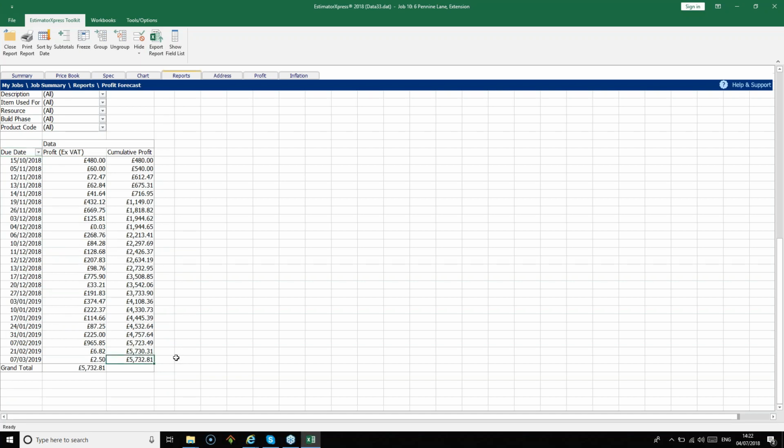If you have set the job up with all the profit markups set at 30%, then our general assumption is that half of that, the first 15%, will disappear in company overheads, thus leaving the remaining 15% as your actual net profit. So looking at the figure on screen, you'd want to halve it to get your actual projected net profit. So here's a quick example regarding profit. Imagine the total profit figure for a particular job is £10,000. Then your net profit would be approximately £5,000. So let's assume the price of your job to your customer is £42,000 plus VAT, which comes to just over £50,000.